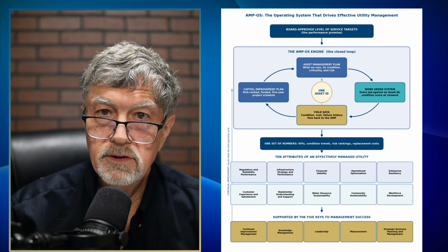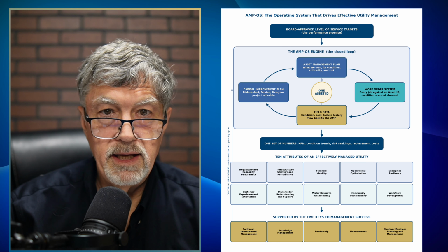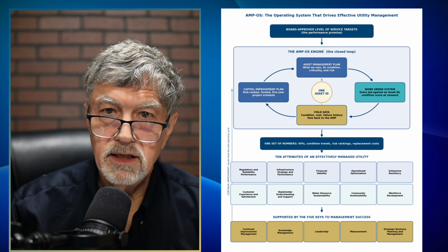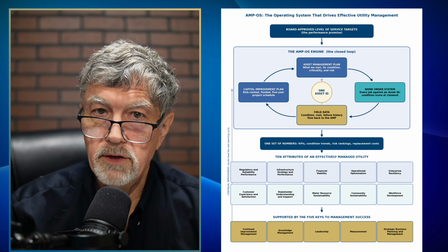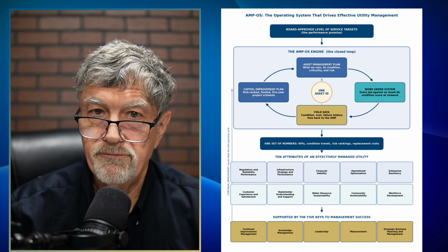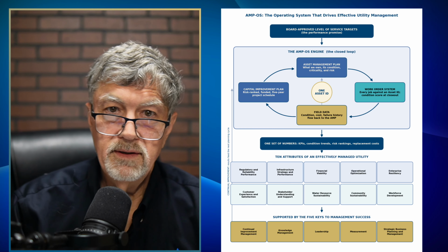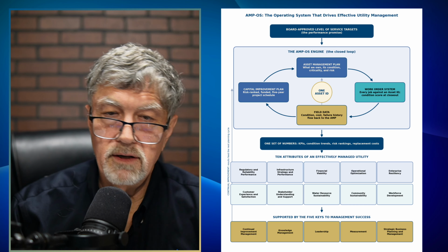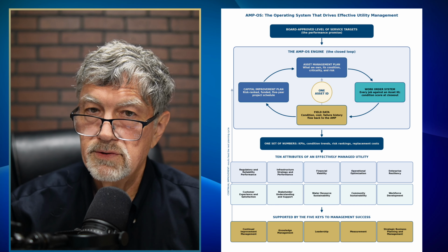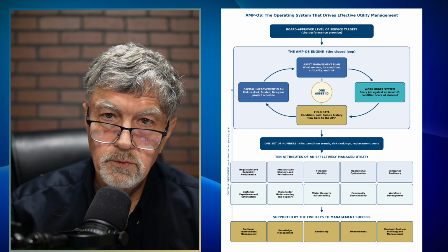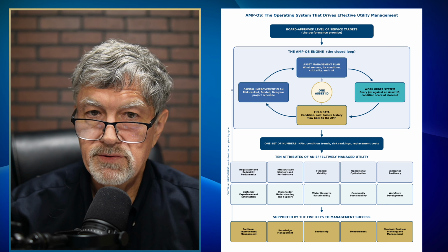So, what does it cost? Being straight with you, about 2 minutes per job per operator, and a 15-minute standing meeting each week to post the updates. The forum launches in week 4 of implementation as soon as the first asset IDs exist, not after the plan is finished. The measure of success in the first year is not perfect data, it is adoption. 90% of field work flowing through work orders for 4 straight weeks. That is the gate.